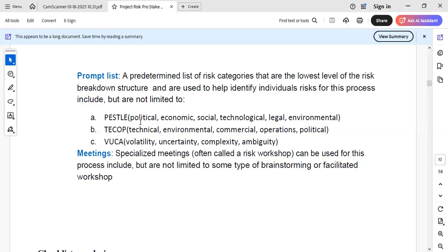Is it a social risk? Is it a legal risk? Are we meeting up with the permits? Is it an environmental risk? Does the project have to do with materials, with liquids, that if not carefully contained, may spill and cause some kind of degradation? Are there things like that? So these are what you analyze.